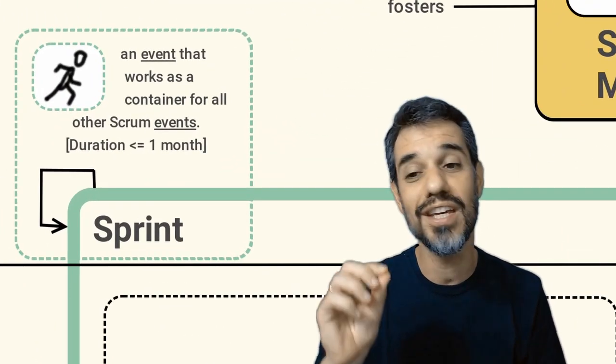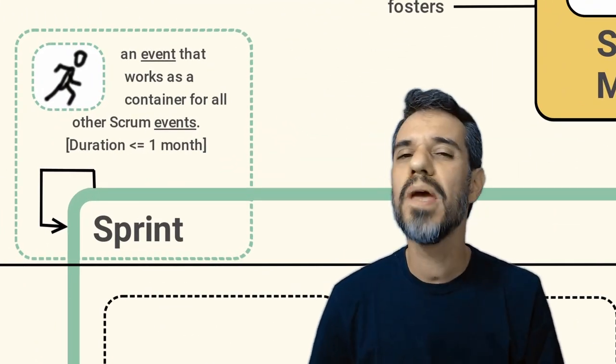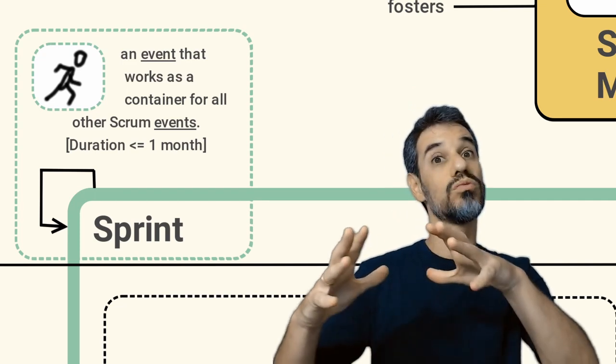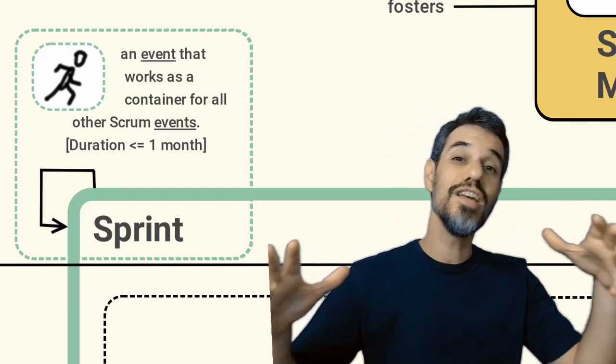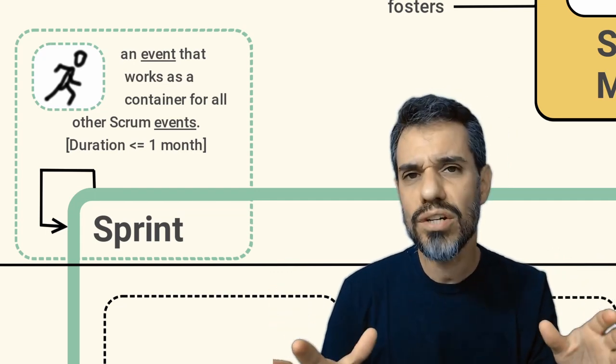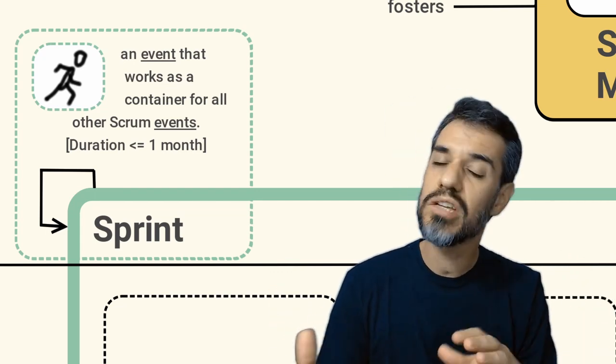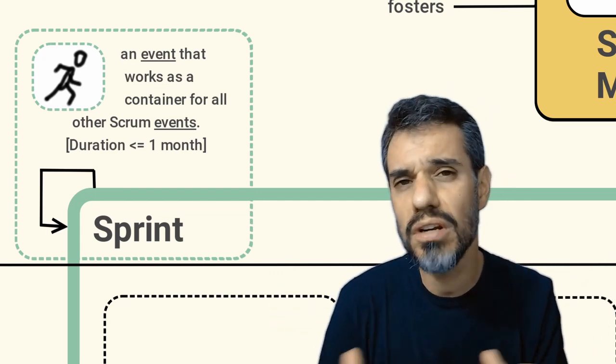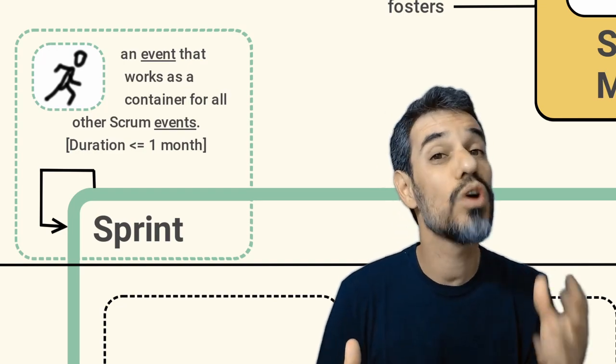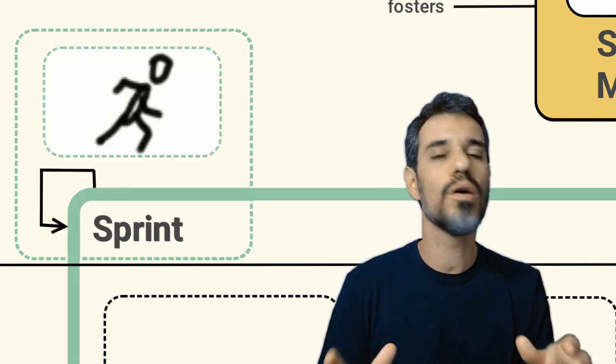The Scrum Master should ensure that the events of Scrum are happening. The first event we are going to see is the Sprint. Sprint may be seen as a container where all other events happen inside Scrum. The duration of a sprint may change from company to company, but usually we may say that it should not pass over one month.